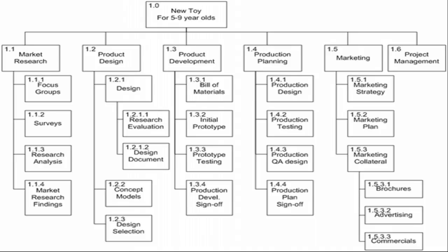Define the activities that make up the work package. So step number one in scheduling is activity definition. What activities do we need to do to deliver a work package? Just like the example I gave you for the building project, we divided the building project into three work packages: the foundation, the laying of the blocks, the plumbing and piping and everything, and then the finishing.